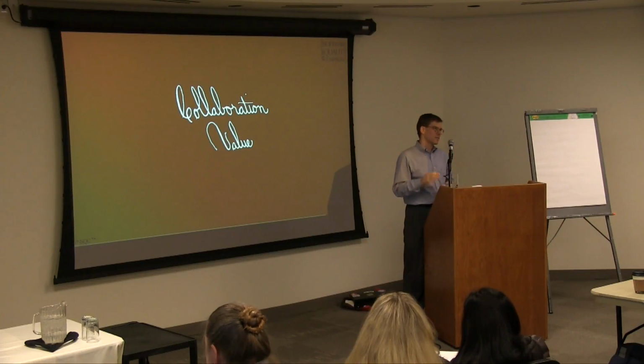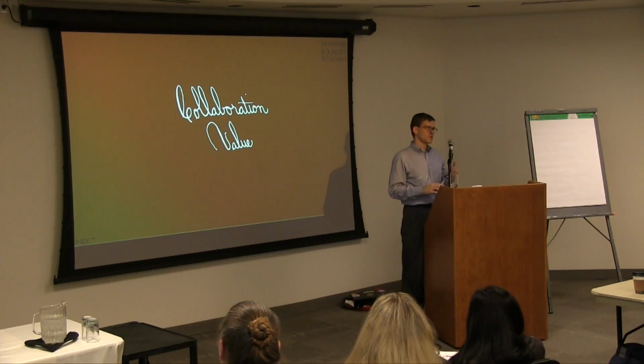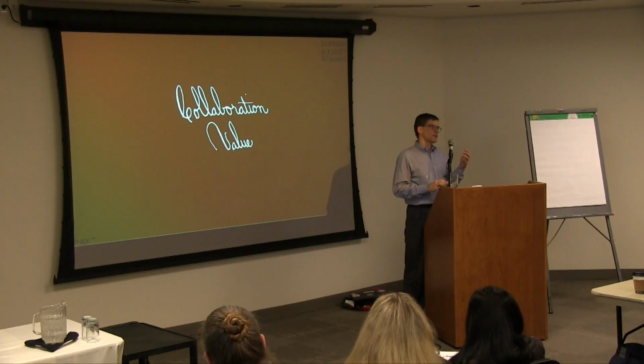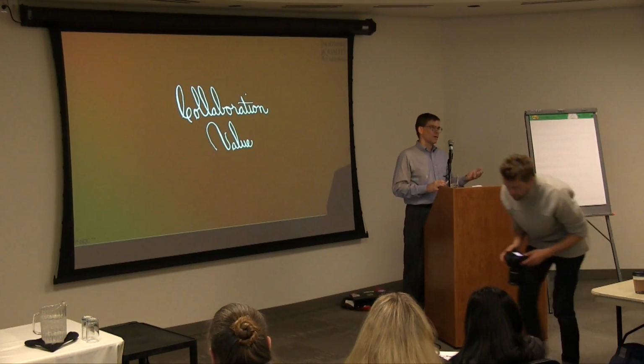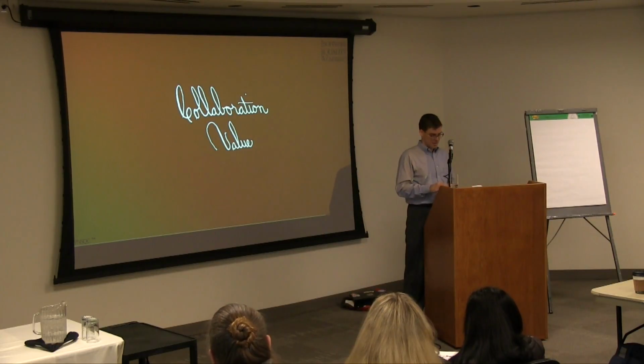preemptive acceptance tests that would fail prior to them writing the code, so that we would collaborate together with the stakeholders on their behalf to make sure that we had enough detail about what they wanted the implementation to look like, so that we could write acceptance tests that would fail until the appropriate code was written. We'd supply those to the developers, then providing them an example that they could replicate in the future without our input. This allowed them to succeed in meeting the stakeholders' requirements without any additional rework required at the end of the day.